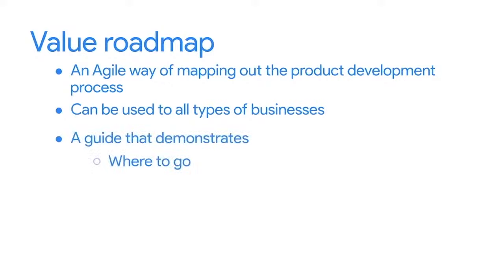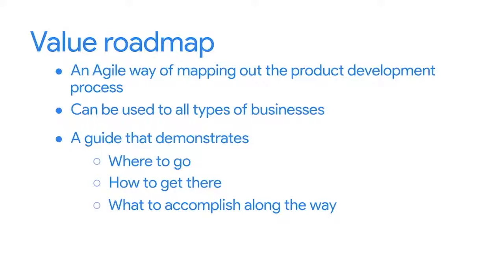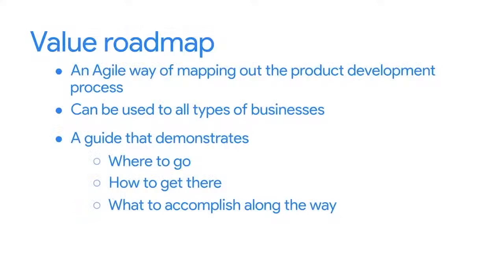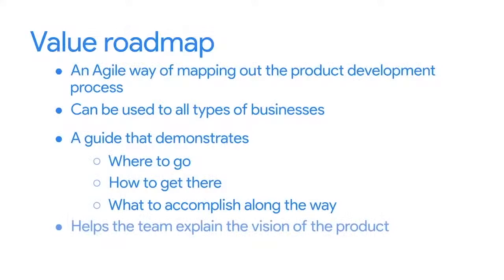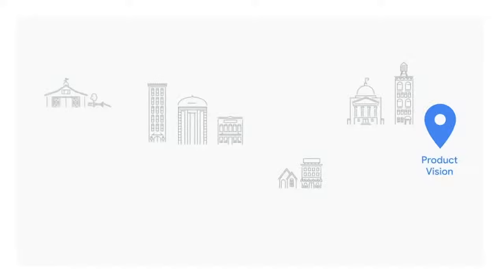As a project manager, part of your job is to help teams stay focused on delivering value. A great way to do this is to build a value roadmap — an Agile way of mapping out the timelines and requirements for the product development process that can be used in all types of businesses. This roadmap is a guide that demonstrates where to go, how to get there, and what to accomplish along the way in order to maximize value. It helps map out a product idea and the strategy for how to deliver it. As the team follows their roadmap, they gather input from customers and stakeholders and apply their findings to each iteration of the product. A typical value roadmap has three components: a product vision, a product roadmap, and release plans.